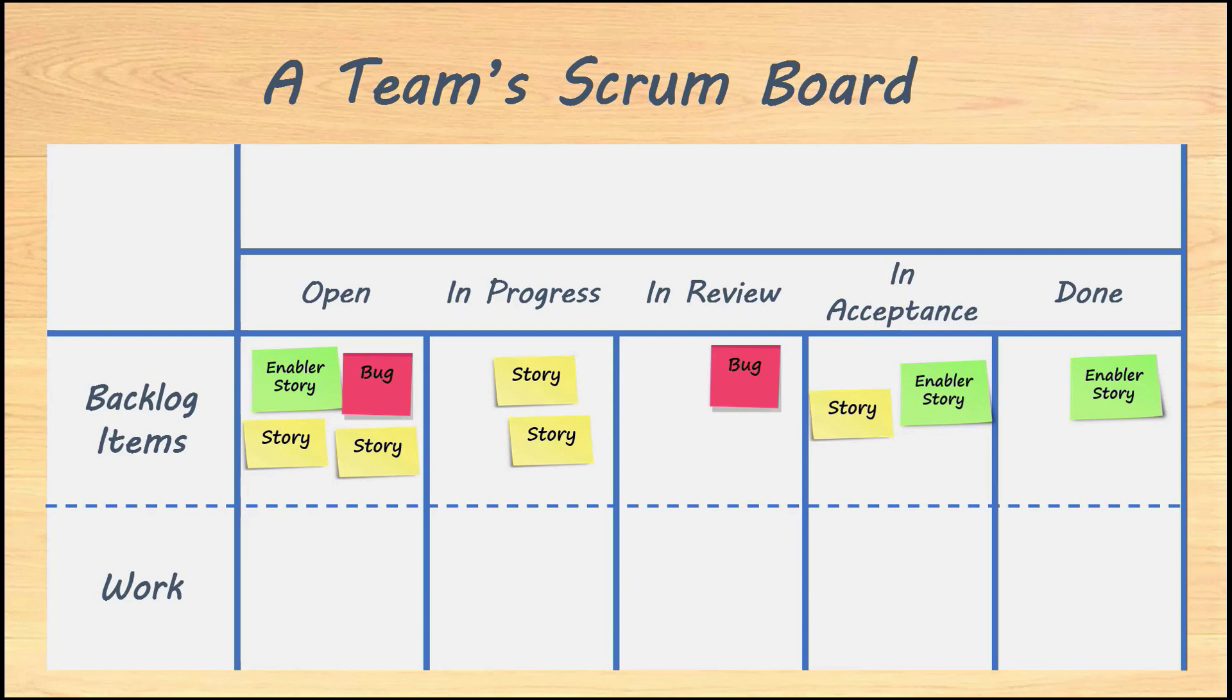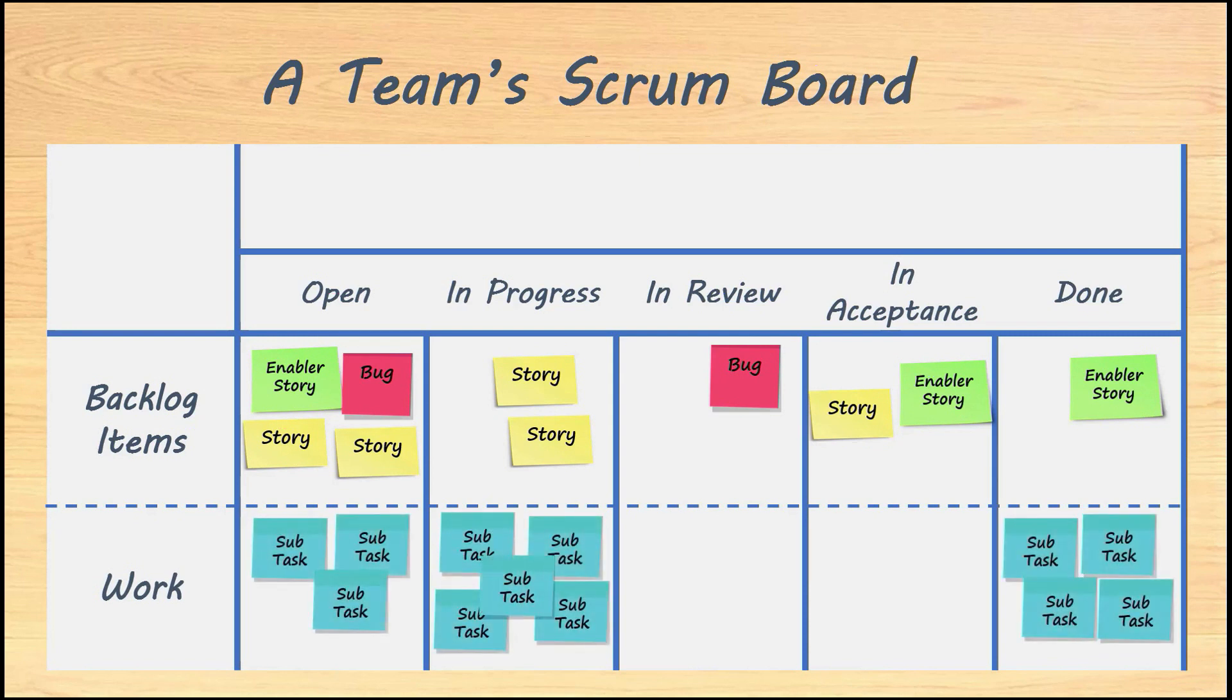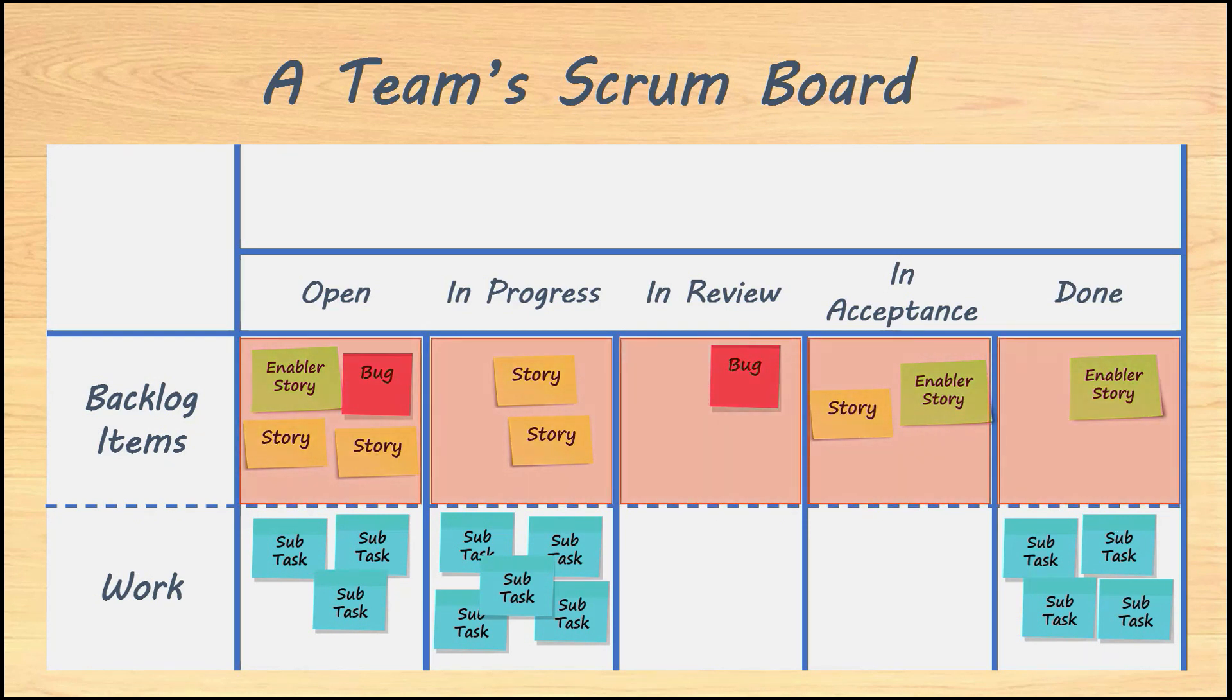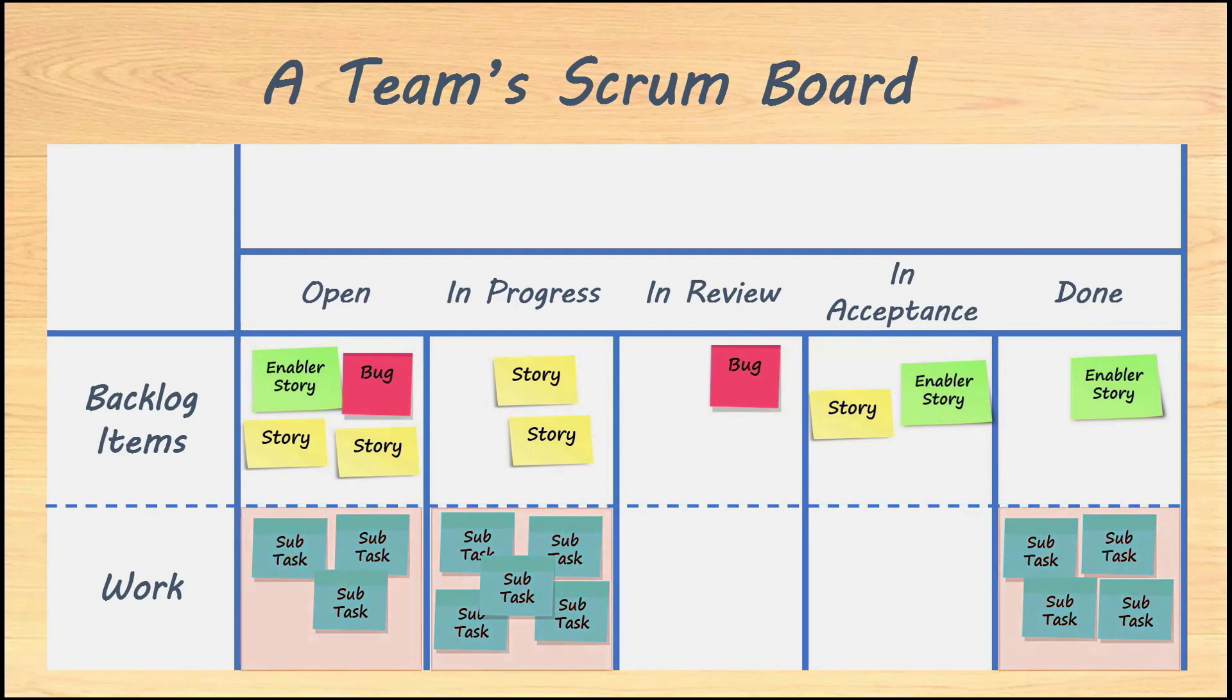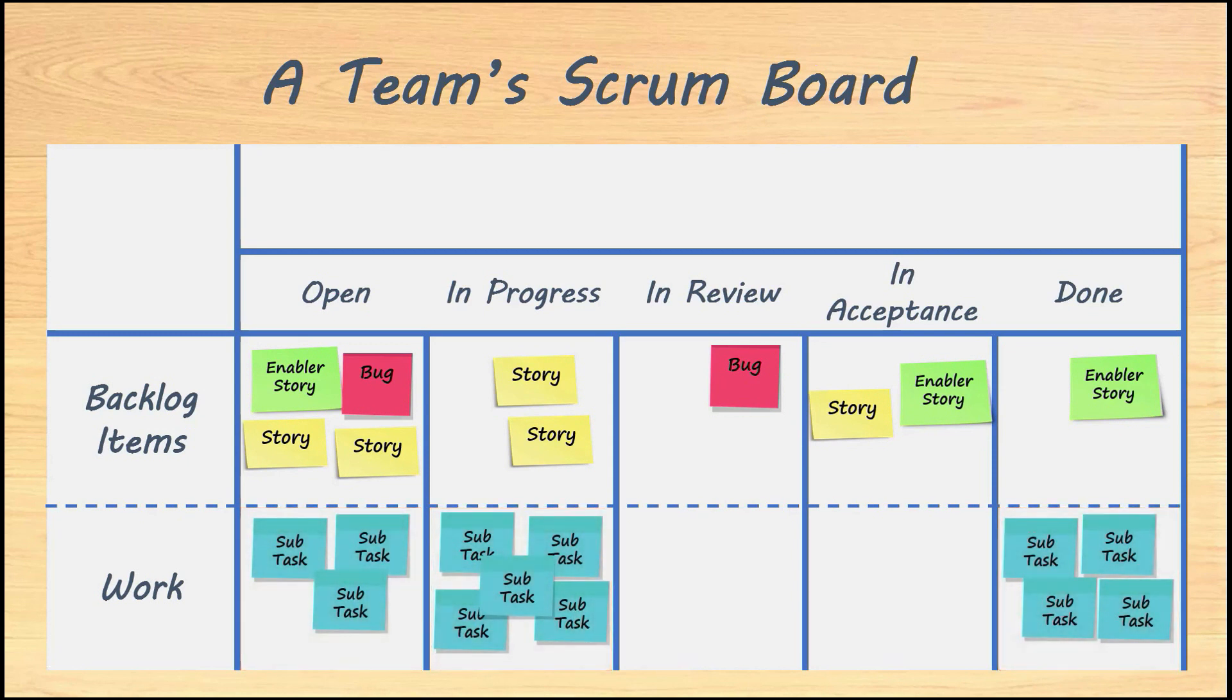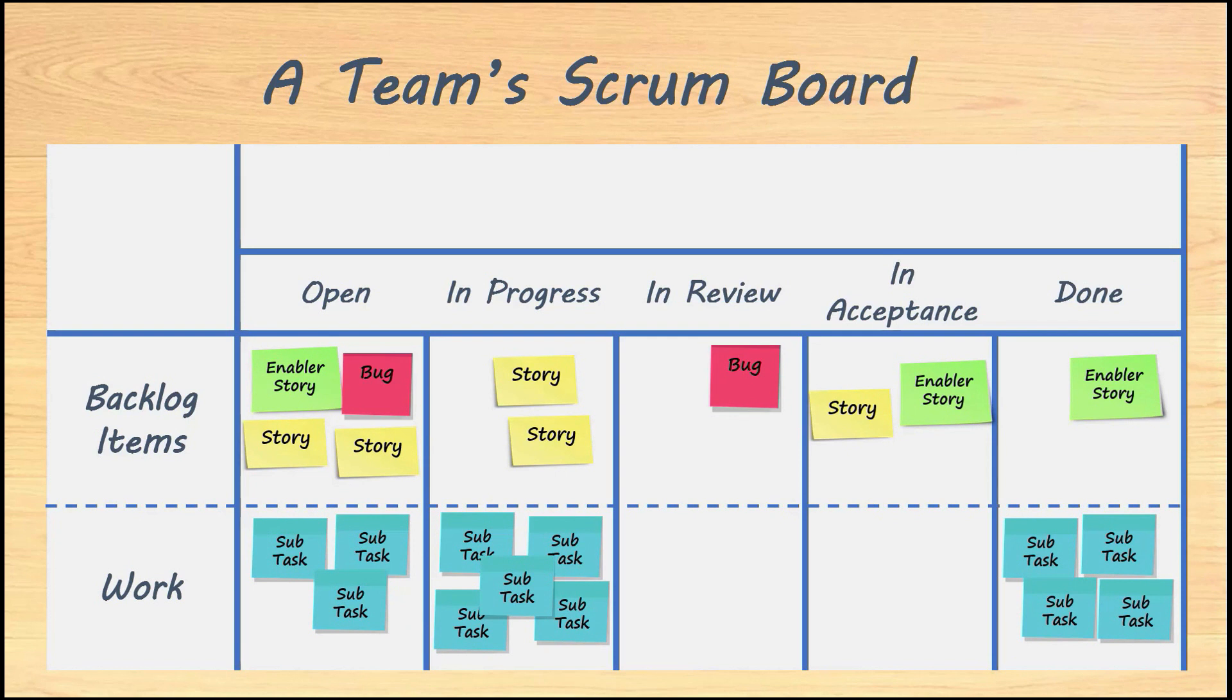The second streamline includes all the subtasks that must be completed throughout the iteration to ensure a successful delivery of the backlog items. This is the daily work that the team members discuss during their daily stand-ups. This is, by far, the most common type of information that can be found in scrum boards. The way that JIRA works allows you to immediately know to which backlog item a subtask is contributing. Both streamlines share the same board. By default, and as you can see, it's the upper streamline that uses all the statuses, since it's the most complex workflow. On the other hand, the lower streamline only uses a subset of them. This is because the life cycle of subtasks is simpler by nature, and that's the workflow that we use to keep track of the work being done. What makes this board possible is the compatibility between the several life cycles of the different types of items involved. In fact, we are talking about two different workflows: one for the backlog items, and another one for the subtasks.